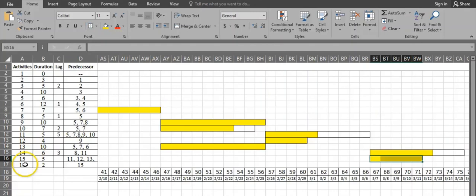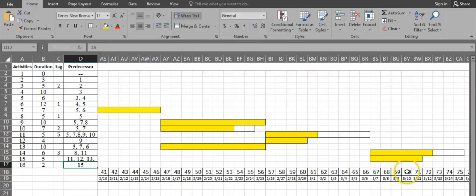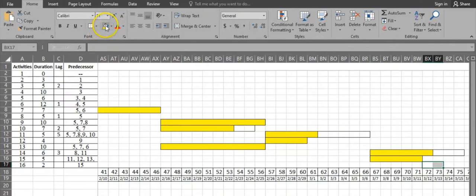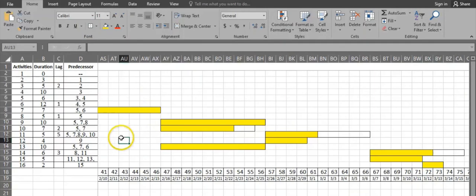Activity 16 is the last activity. It has a duration of 2 days and its predecessor is activity 15, which ends on day 72. Activity 16 runs for 2 days: 1, 2, and the project ends on day 75.